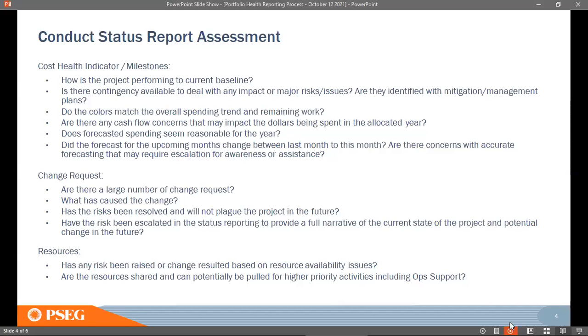So change request is a big thing, and we need to focus on not having a huge amount of change tickets. And by change request here I mean the justification documents that you are putting in the system to change your committed delivery date or to get more funding. So this is project change request, which is the justification document.